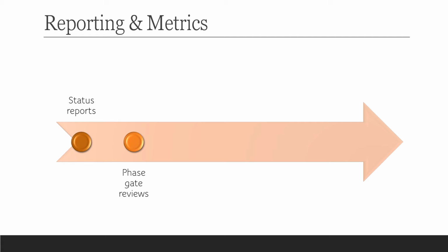Basically what's happening at each of these gates is that the project's senior stakeholders meet with the project team to see if indeed there is still a need for this project. It's an opportunity for everybody to check in. Are we still aligned with corporate values? Does the organization still need it? Is it all right to release yet another tranche of maybe thousands or millions of money?